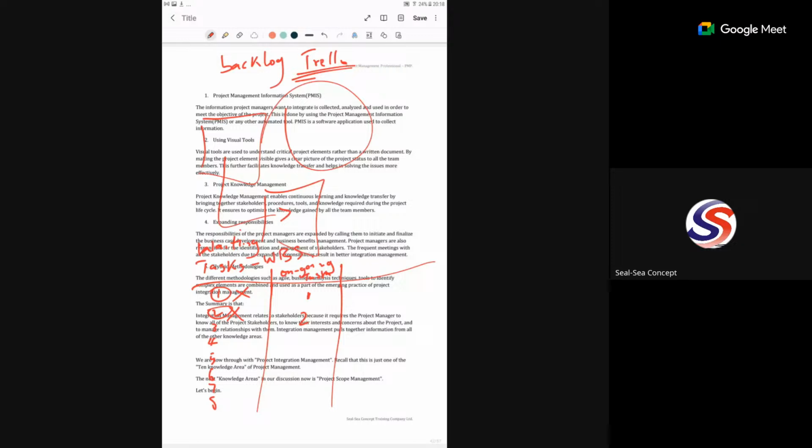Automatically, this place will be what? Erased. You will not find them here again. So they are now under this place. So when any of the team members comes, they will see that task 1 and task 2 are ongoing. The only question they will be asking is, which of the team are working on this? Because maybe the people to do task 3 and 4 will need the output of task 1 and 2 before they can commence their work.